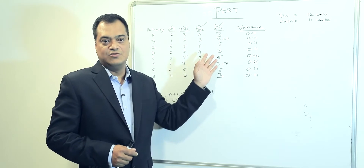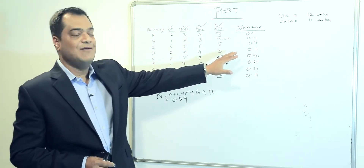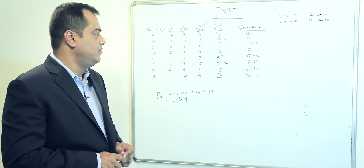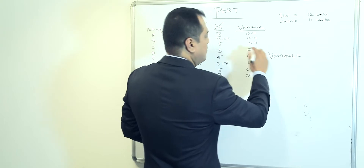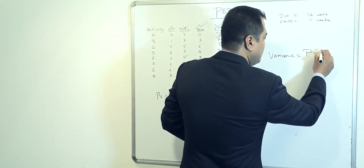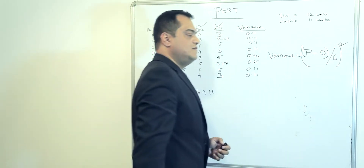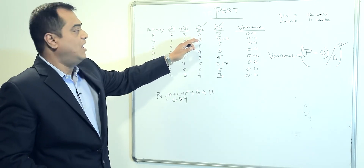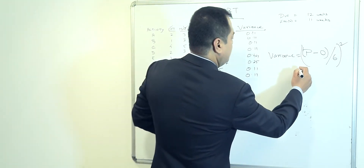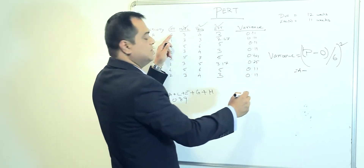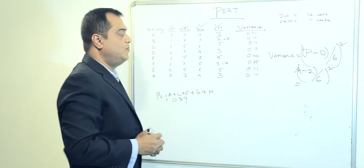To create variance, the formula is: pessimistic minus optimistic, divided by six, squared. So in this case, pessimistic of four minus optimistic of two, divided by six, squared — that comes up with a variance of 0.11.